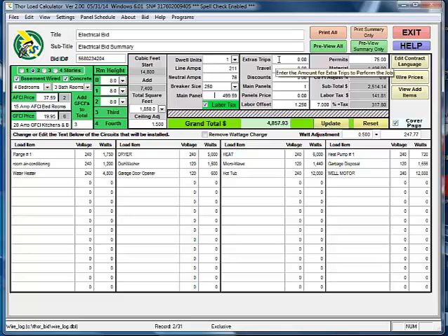Also, we have a location for extra trips. The bid includes per contract language. Again, you can change the contract language. It states you'll have 3 trips for the trim and 3 trips for the rough end. If the customer says that due to circumstances needs extra trips, here you add a fee for extra trips. So let's just say he's asking for 1 extra trip. Assuming that it takes X number of hours, we'll put in $150 for the extra trips.